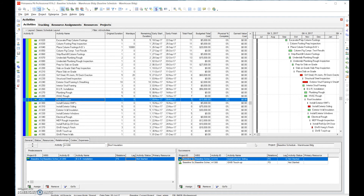By going through excess float numbers, we're able to quantify which activities need attention — either providing lag to help prioritize submittals or adding in missing successors. In summary, step 12 — reducing excess float — covers the definition of excess float, what float means, and the two ways to address it: identifying missing relationships or missing predecessor-successor connections. Many people skip this step, which is why you see things like missing relationships and open networks.